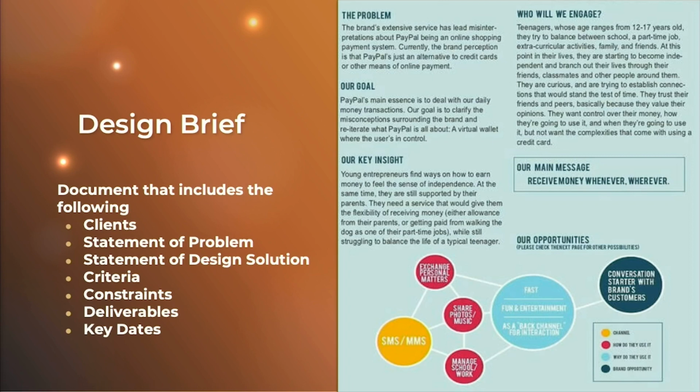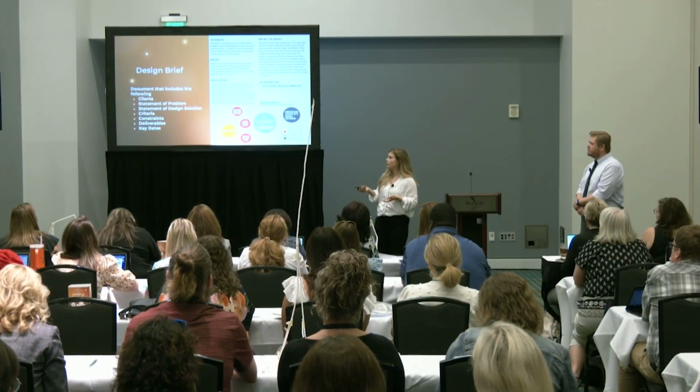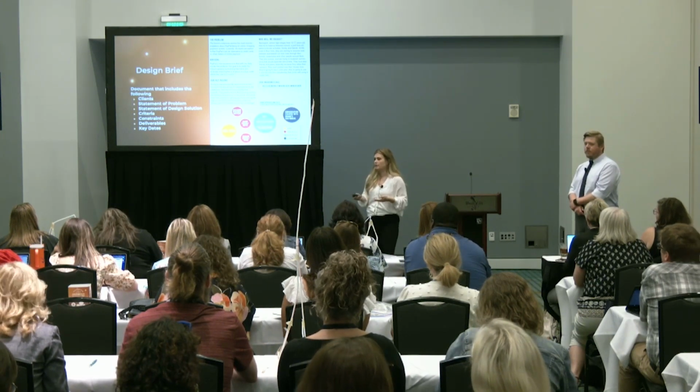Again, here are those design briefs, and I love starting out projects with the design brief. It's going to tell you who your clients are, so who's your target audience, who you are designing this for, and a statement of the problem. Typically, I'll have them write in the design solution, what they are actually designing. Then the criteria, what it should do, constraints, parameters it needs to be within, deliverables, what they need to turn in for this project, and key dates. Sometimes I'll do this for them, sometimes I have them make their own design briefs.